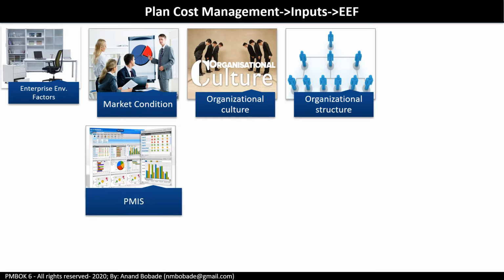Project management information system. It is used as a tool to create the project budget. Always remember there is a confusion. Now, software as a tool is considered an enterprise environmental factor, whereas the data created using these tools is considered an organizational process asset.